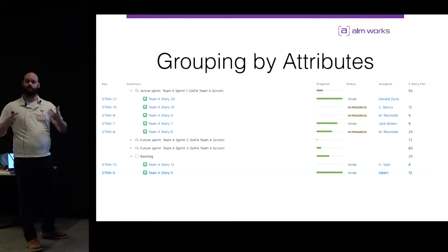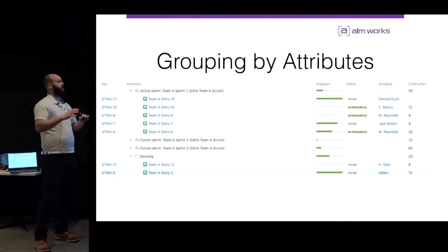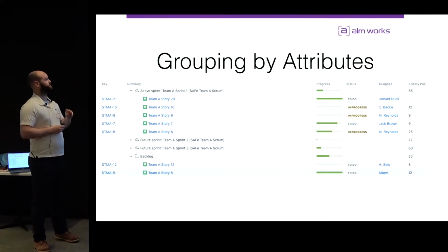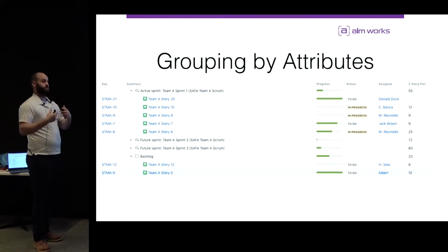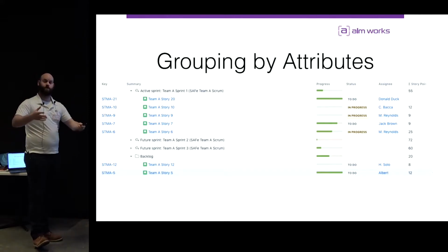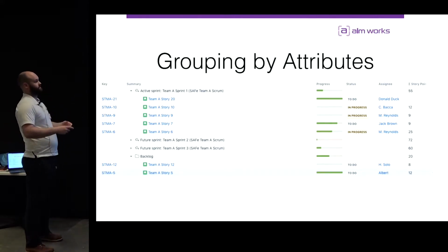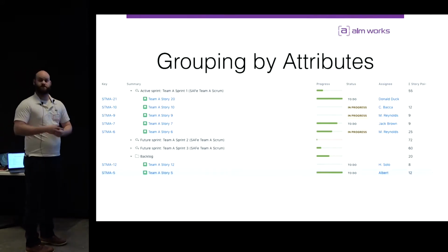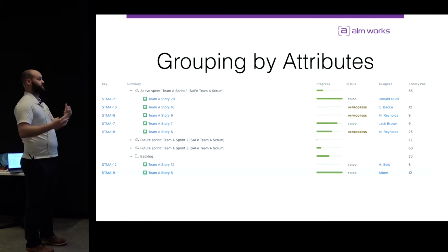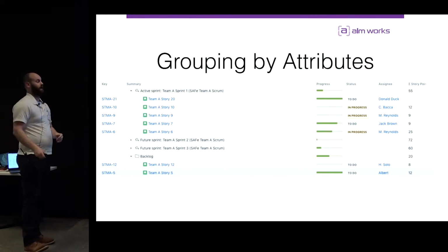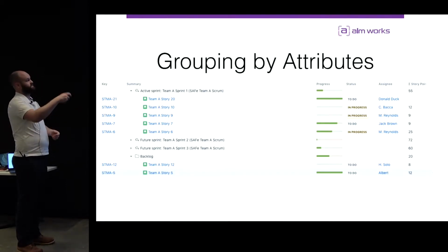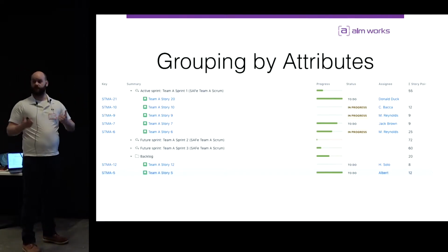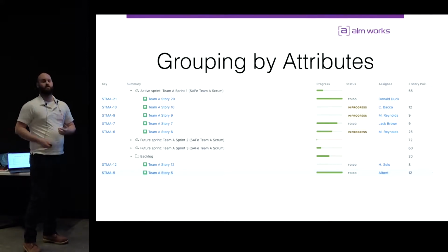It's kind of a small example of where structure can help, but we can customize exactly where we want to look at. We can see the amount of story points that we've committed to. So knowing our velocity, we can say, all right, now we've committed to too much or we've committed to too little. We can see that we seem to be committing to more and more work in the future. So that means these sprints need to be changed and we need to basically move some work out of these sprints. And we can see assignee and status and progress.